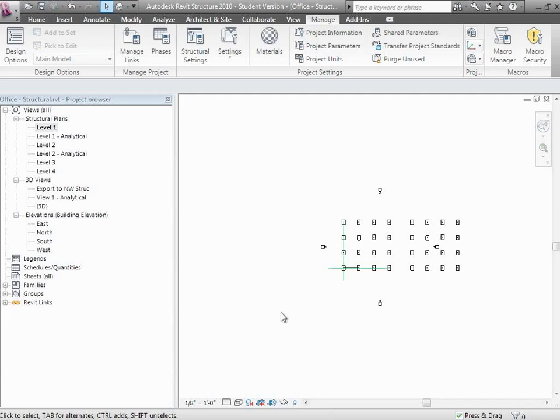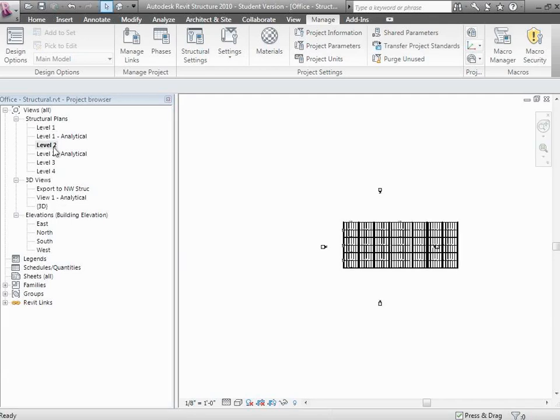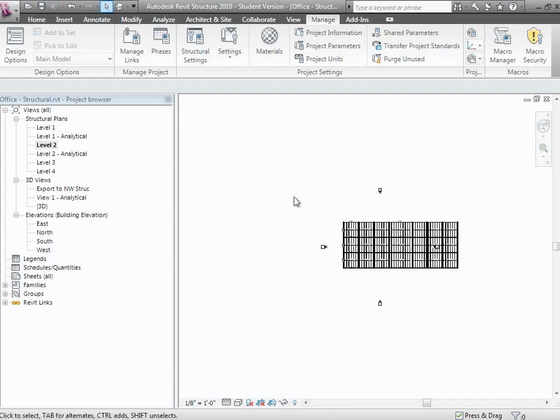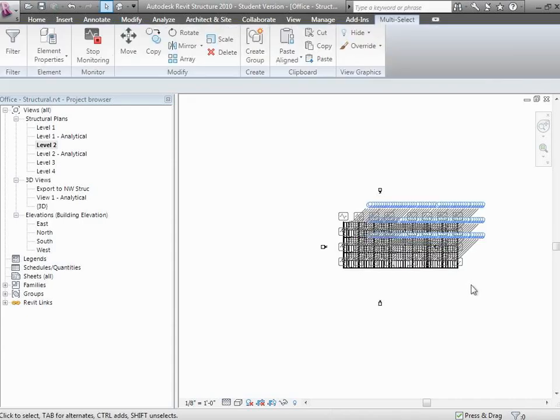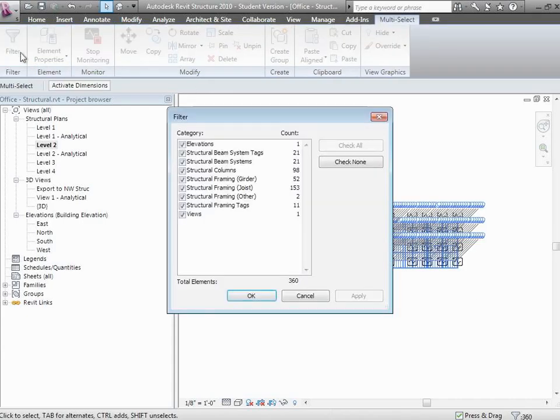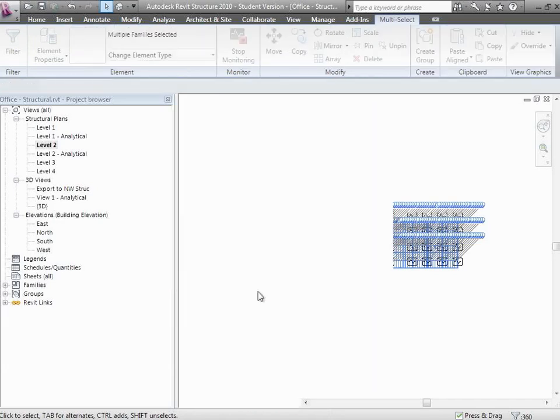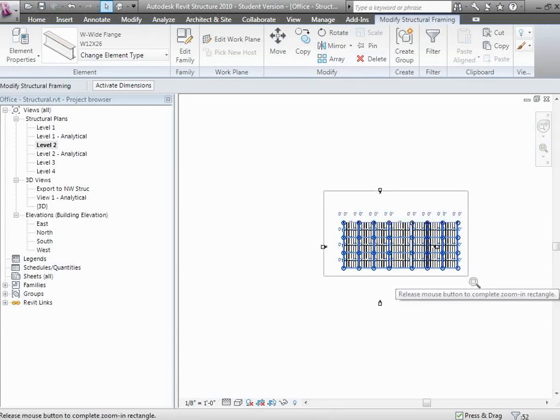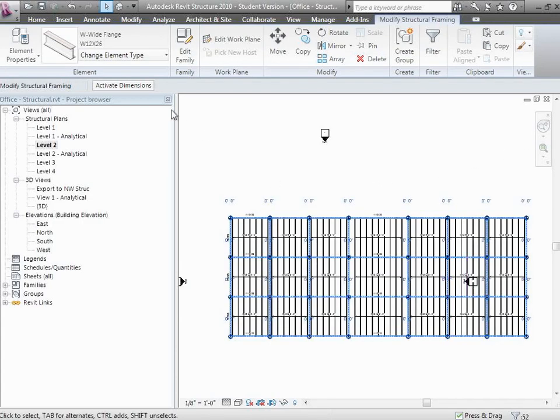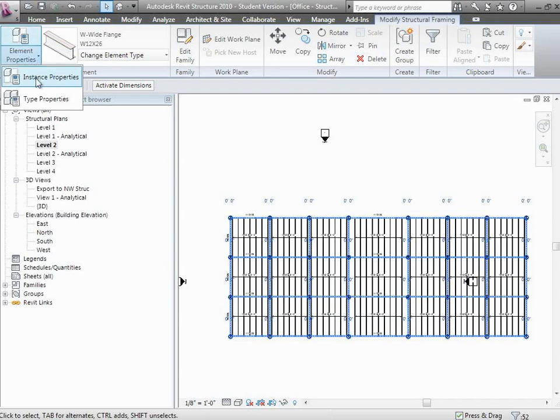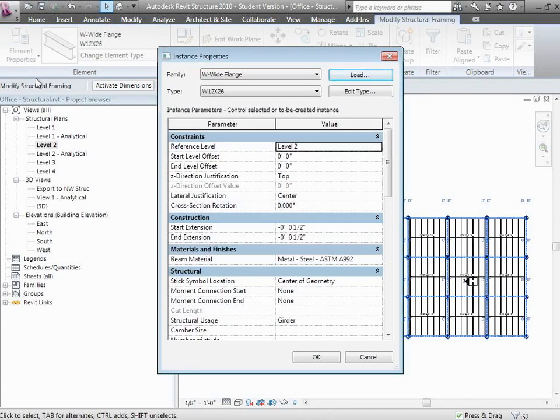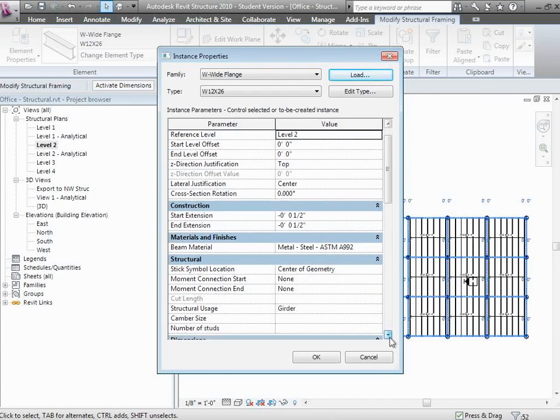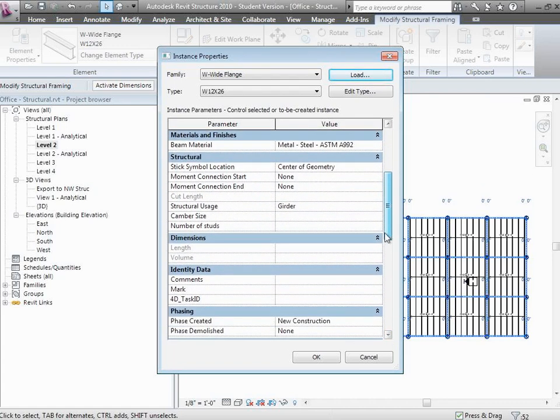For the beams, we could select those. The key is always thinking about the view that enables you to grab things easiest. For the beams, if I want to get all the beams at the top of level one, I can go to the level two view and look down. Or if I had a ceiling plan view, I could go to level one and look up. I'm going to go to level two since that view's already set up. I'll choose all that framing. I'll do a little filtering and grab all the girders. That's all of those elements, what I think of as the beams. Now I can change all those, and they're going to be the 130 task.